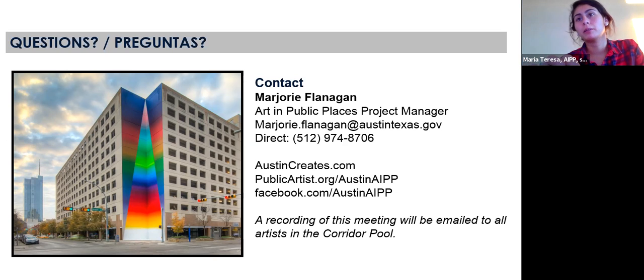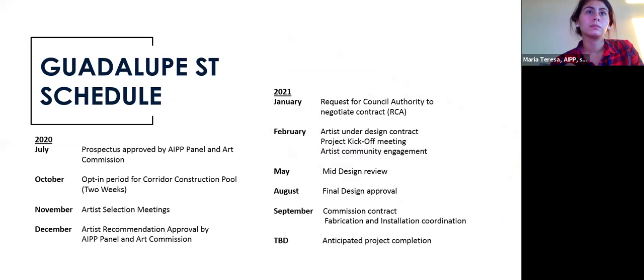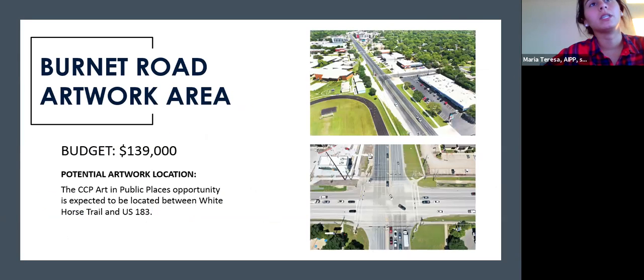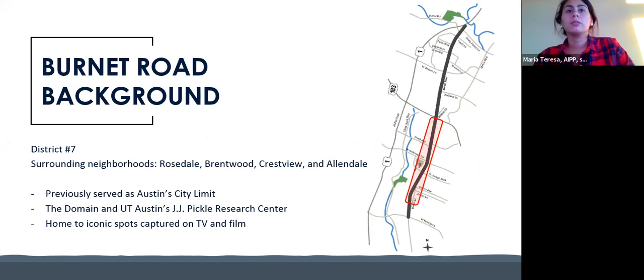All right, so can I describe a little more fully the type of improvement envisioned for Burnett Road? Yes, I can. Just allow me one moment. The improvements that are looking into being put into Burnett Road include upgraded traffic signals, drainage, intersection turn lane modifications, ADA sidewalks, median aisles, and bus stop improvements. Construction is scheduled to start in late 2020 with anticipated completion in 19 months.